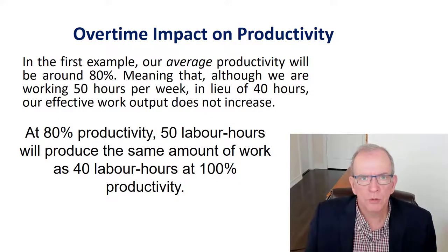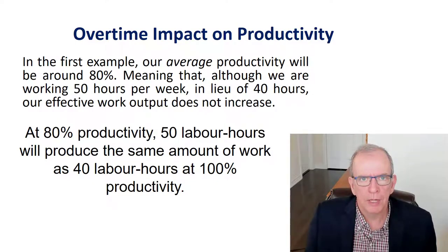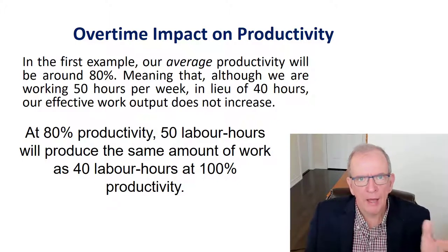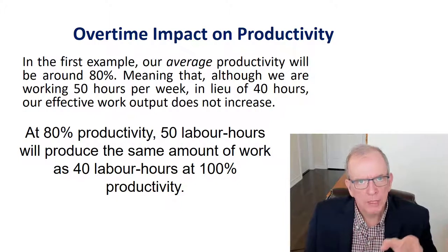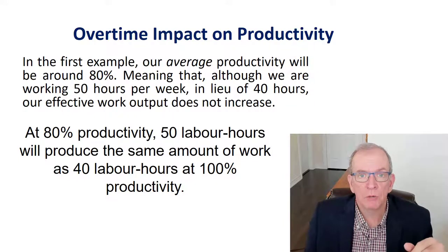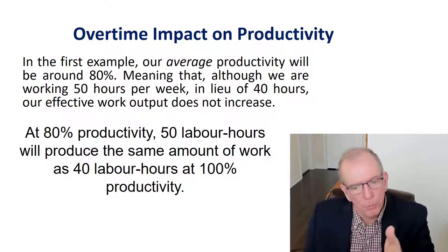No client is going to want to pay for anything extra than they have to unless you can really demonstrate it to them. That's where it's very helpful to have effective documentation, to have excellent baselines for a budget taken from your estimate, and to have monitored and tracked the work so that you can demonstrate, well, look, especially on something where you've got a lot of repetition, we were going at this rate till boom, this occurred.